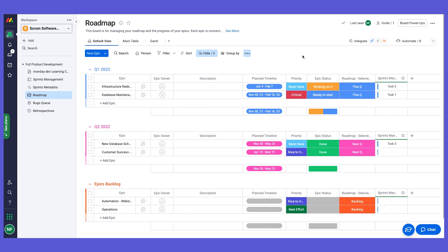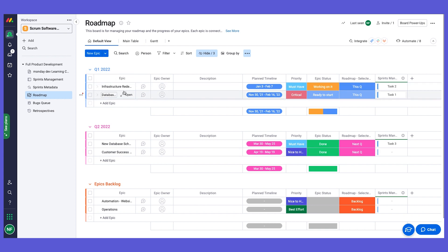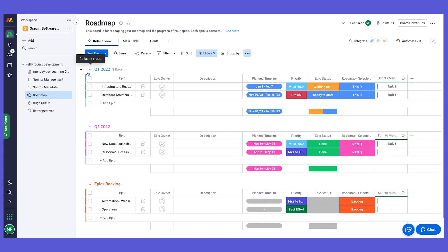Every monday.com board is divided into groups and items, and then all the items have columns, which is the data points that we want to collect for each of the epics. Here we have every group would be a quarter except for the bottom group which would be our backlog.